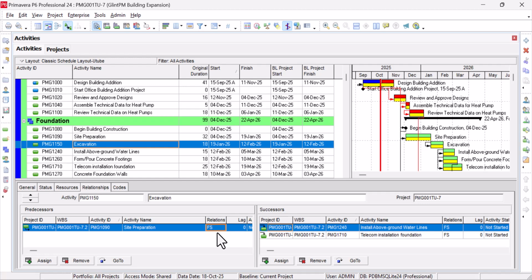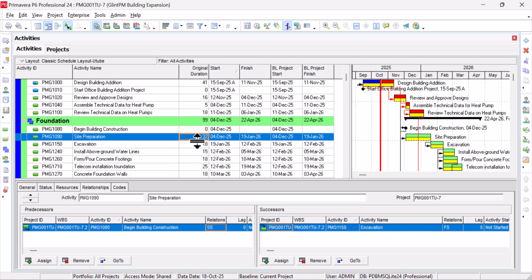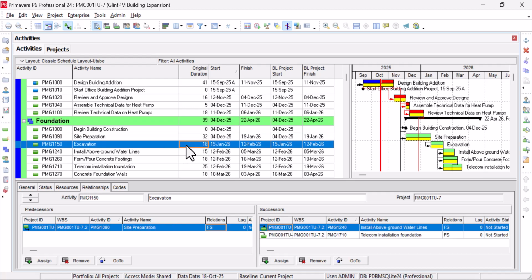And your duty as a scheduler or planner is to be able to inform your team, let's put it this way, based on the schedule. You look at it, you analyze it: what's the best case scenario and what's the worst case scenario. So if we do these activities before this one finishes, this is the implication you explain to the team. Okay, if you have to wait for 6 months before we start excavation, we're going to be losing resources, and there's going to be some risk attached to it. So all this should be analyzed.